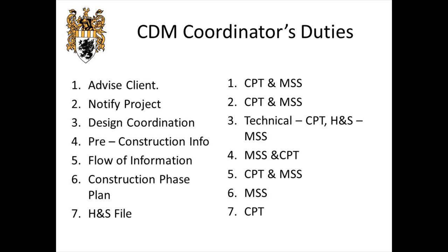The pre-construction information pack is a combination of myself and capital projects. If we need surveys undertaken or information brought in, capital projects pay for it — I just advise that it would be useful to have this or that survey. A lot of information also comes from the university, and Tim provides that. The flow of information is managed by both of us: mine is specifically health and safety, while contractual changes or changes of detail go mainly through capital projects, but if it's a health and safety aspect it comes through us to make sure it gets to the right people at the right time.